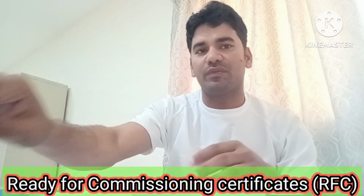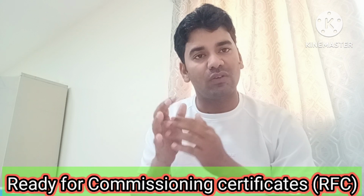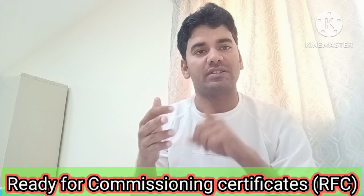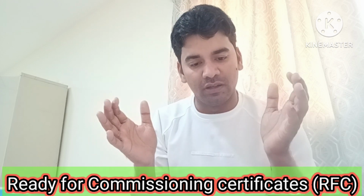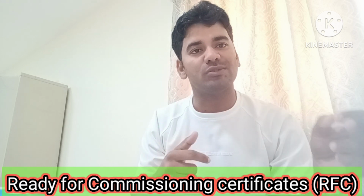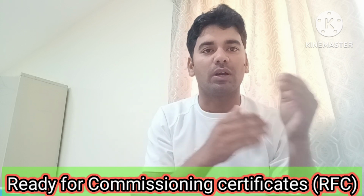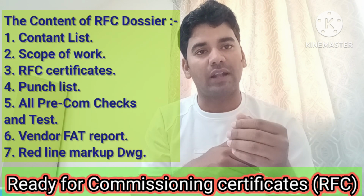Ready for commissioning certificate is the basic detail of a ready for commissioning certificate. Confirm the completion of all the pre-commissioning tests and checks, like hydro testing, pneumatic testing, air blowing, internal cleaning, sandblasting, that all are completed. A ready for commissioning certificate requires the clearance of all A category punch points before the testing. Whenever all these activities are completed, that line is going for commissioning. Before going for commissioning, this certificate needs to be signed by the client.